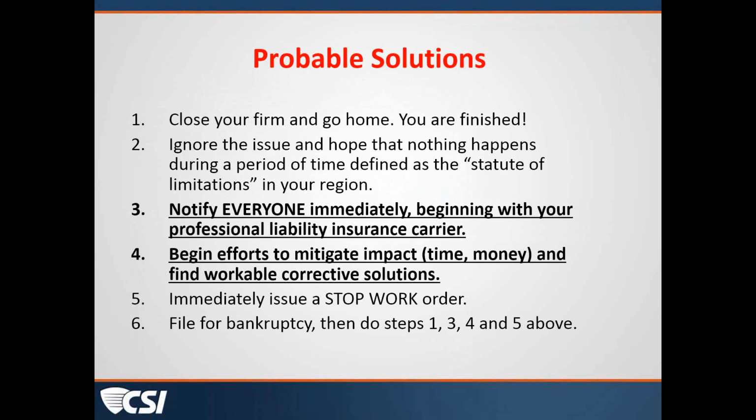So I think that kind of ties into number 3 where it says everyone in large, all caps, is that you're notifying not only your professional liability carrier, you're notifying the contractor, and you're notifying the owner that this is an issue out here and we need to jump on it right away. And I think the part of the discussion about that stop work order that is really important, and it seems very understandable, but there are many who do not understand that, in fact, that is not one of the responsibilities of the architect, that it is, in fact, the owner who issues a stop work order. And should you do that by mistake, that sets off another whole set of consequences that would be associated with that project that are no fun to sort out and clean up.